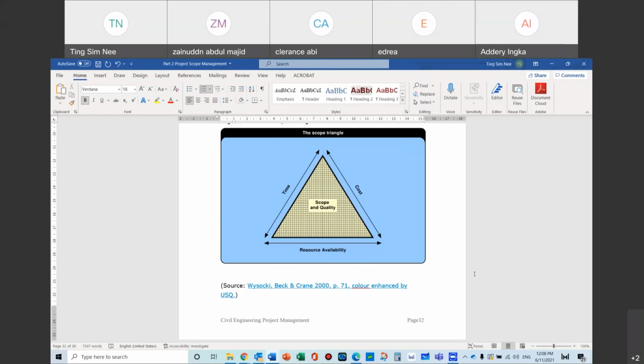Say, is it going to be a 4-lane road? Is it going to be an 8-lane road? How many links are you going to be building here? What are you going to stretch more into certain areas? Or in this hairline, are you going to do a full hairline, for example? Are you going to do just serums? Are you going to do serums plus something? So we do have that sort of consideration, and this is what we call option studies. And in these option studies, you are basically also doing mainly what we call the cost benefit analysis. And this is the part where we compare options with options.